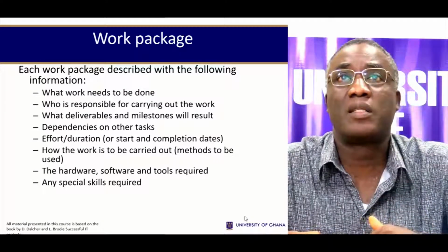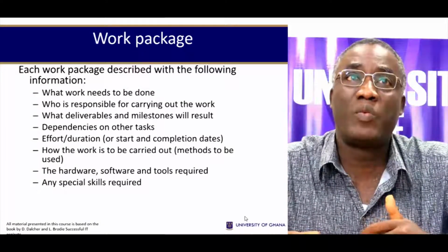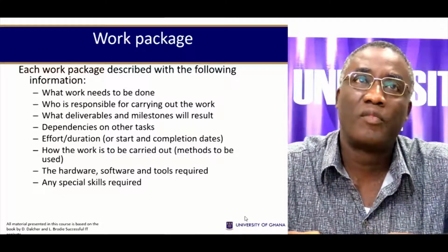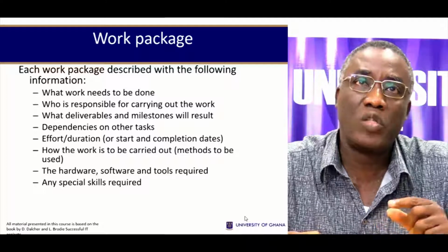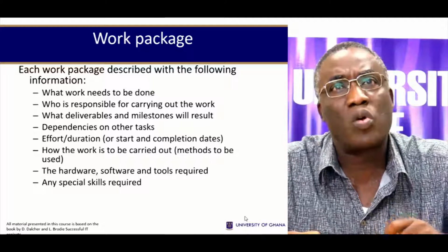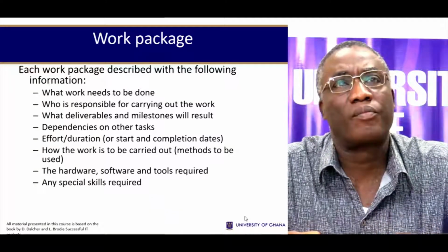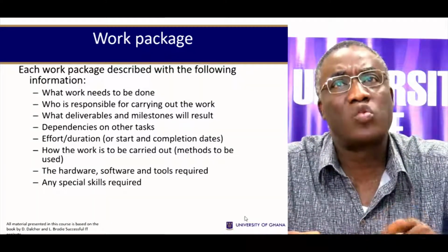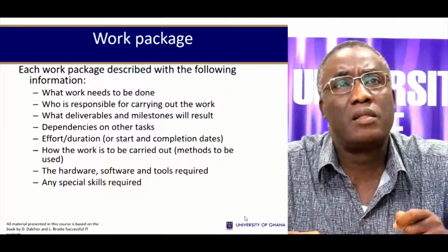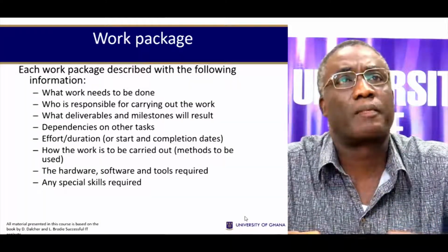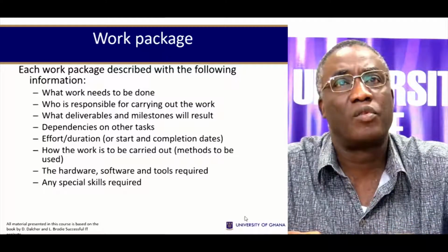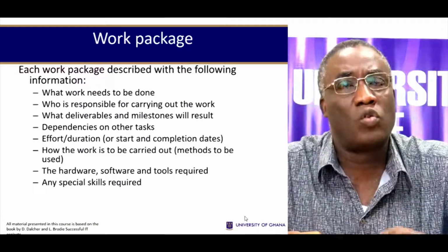Each work package will be described with the following information. What work needs to be done? So for each work package, you need to identify what work needs to be done. Who is responsible for carrying out the work? What deliverables and milestones will result from carrying out this work? How does this depend on other tasks? How much effort do you need in order to complete that task?